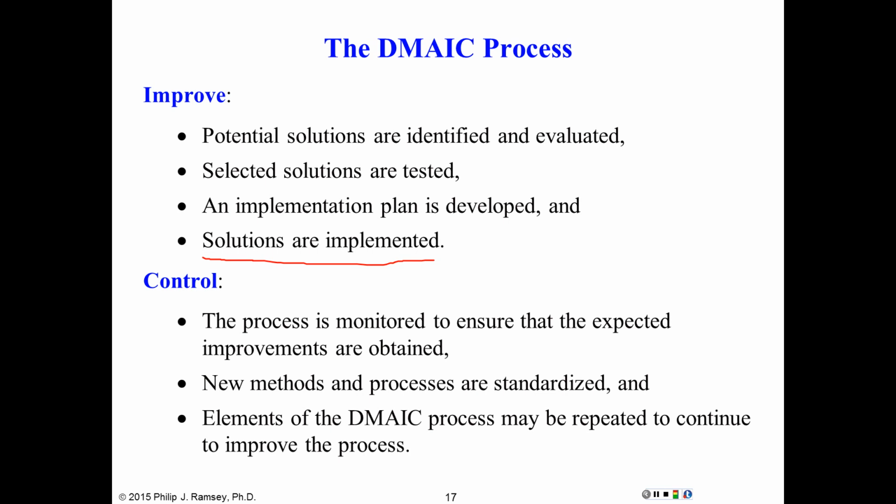They still have primary responsibility for process performance. So you continue to monitor the process behavior. Again, we'll have a lot more detail later on how we monitor it. And we make sure that the gains are achieved. If we find after some length of time, usually the control phase can be 3 to 6 months, if we don't see the improvement, then the team has to decide, do we circle back and see if we've missed something or if something's changed?